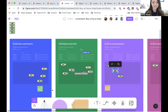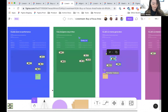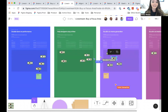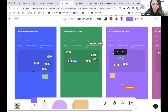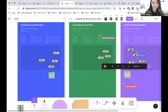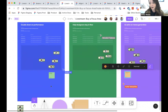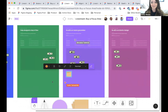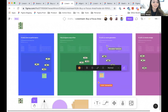This is helpful because you get a sense not just of rank order, but of how much people actually invest. I always set a timer — maybe 10 minutes to spend your money and leave some comments. Afterwards, tally up how much money went where. Then as a group, go through all the post-it notes and discuss: we want to spend this much here — read through the comments and ask people to explain why they spent so much or no money in the various sections.